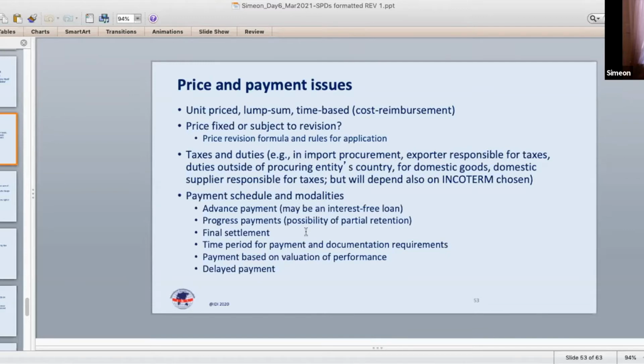But ultimately, assuming that the contract has been implemented and was not rendered impossible, like a force majeure type of situation, but there were some limitations that impacted the total volume of work that could be carried out, I think that would have to be done via a contract modification or negotiation type of process.